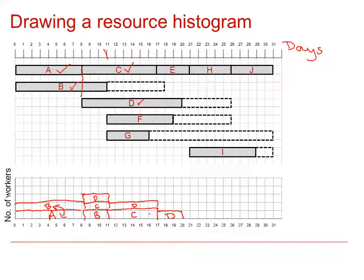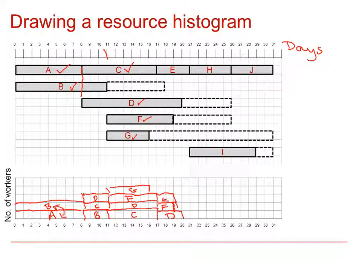At day 11, we've got F, and F continues to day 19. So I draw F to 17, then move down a row to 19. G also starts at day 11 and finishes at 16, so G starts at day 11 and finishes at 16. And then E starts at 17 and goes along to 21 — so 17 to 19, then 19 to 20, and then 20 to 21 on the bottom row.